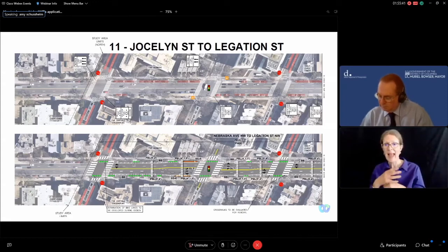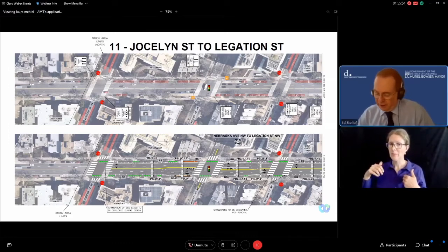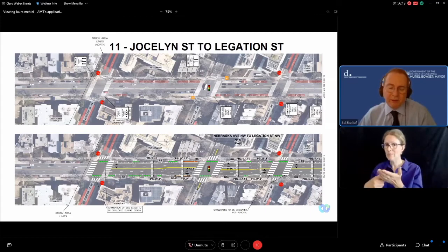Thank you. We had the past chair of the pedestrian advisory committee council on our community advisory committee. So she ensured that we took into account all aspects of timing for seniors, and we will do that as we get closer to the project design. Once we have a design, it'll go to E's group to look at the signal timing again, so it'll be an iterative process until we have a final design. As far as stopping the project, as I said, DDOT and the mayor have selected concept C, the preferred concept.